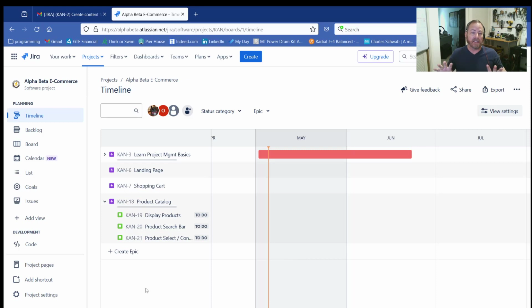There are no details at this point, just high level: what are all the big items that need to be done? Those are epics to complete this project. The stories are the things under each epic that are required to finish that epic, everything that needs to be done on an individual level. And they should be sized so that a developer or whoever can finish them in a 2-week period.